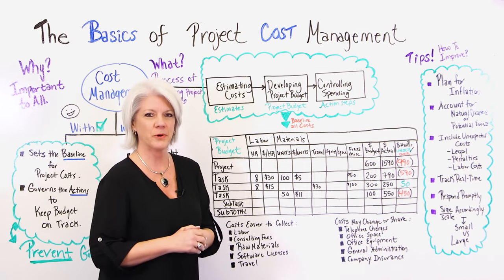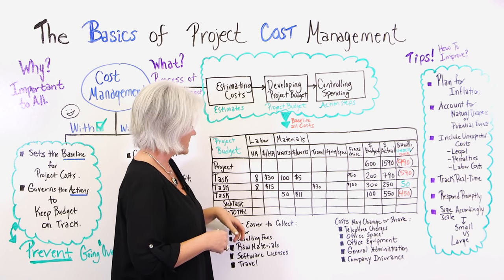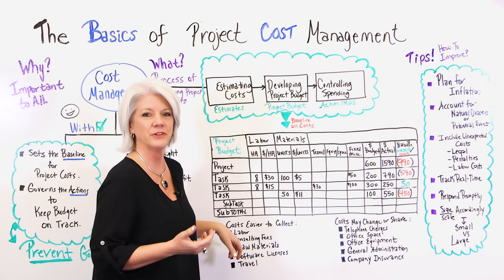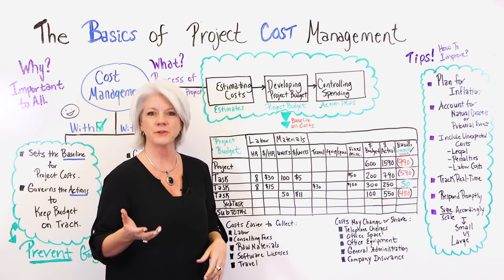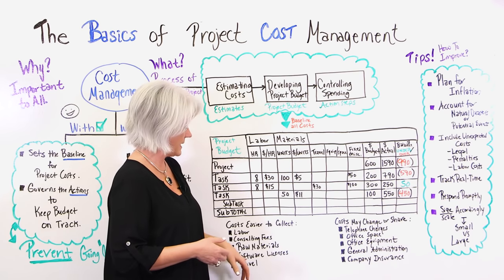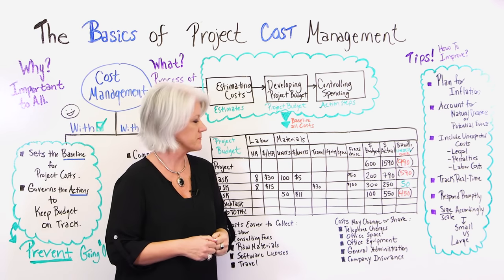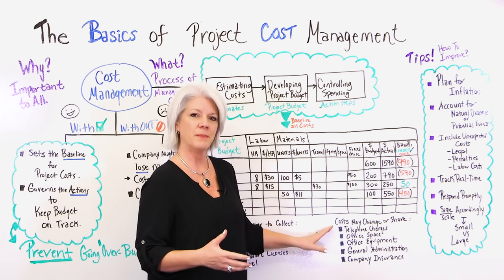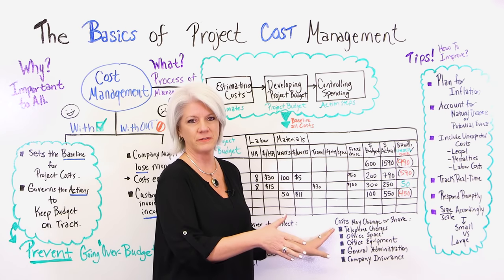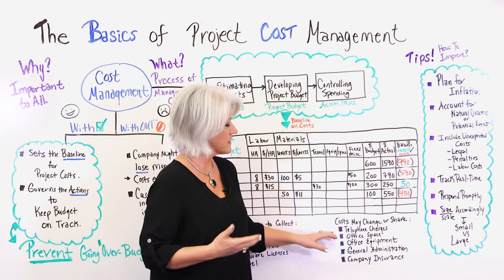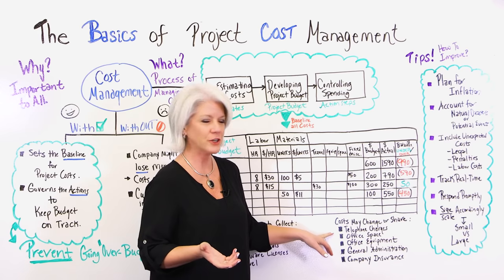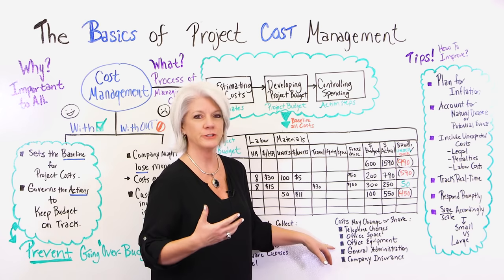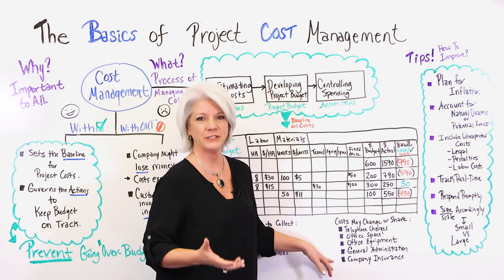There are a few things I want to point out on the template. Some costs are easier to collect, like your labor costs, consulting fees, raw materials, software licenses, and travel costs. And then some of the costs may change, or they may be shared among other projects, or even carry over to other projects. Some of those look like your telephone charges, office space or office equipment, general administration, and company insurance.